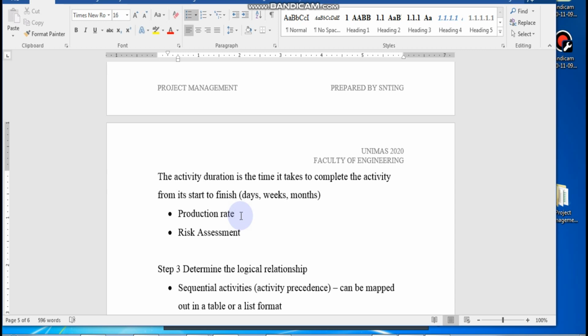How many loads of soil can your excavator upload in a day? So all these are actually found in the understanding of the resources that you have. So the resource data sheet that is available should be attached with what we call a production rate for that particular resource.